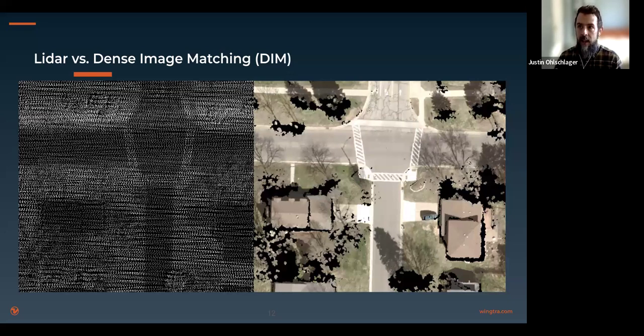So there's a lot of us just learning everything, and honing down a tight workflow from getting all of the raw material into the field, and then from my perspective, getting everything QA/QC calibrated and all this other stuff in order to pass it off to the production team. I could probably see anywhere, depending on the size of the project, anywhere from 8 to 15 hours of process time to get it from the raw stuff all the way to our production team